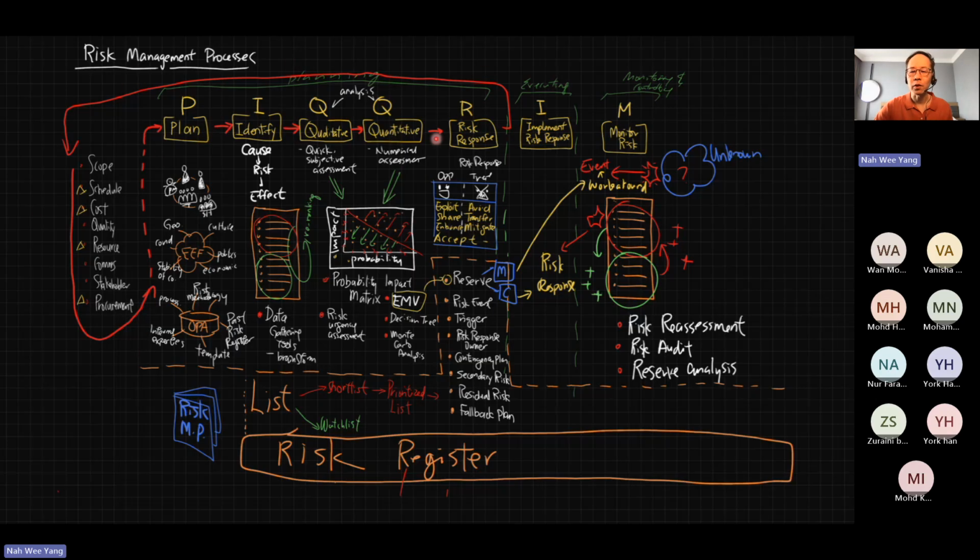And when do we stop the loop? When we're happy with the plan, we think the plan is realistic and stable, and everyone gets agreement to it, and then we can get this plan for approval. That becomes the baseline, the approved plan, right? So this is an iteration of planning. Risk is the last one that triggers all the other replan activities, right? So mainly this covers the process in planning, and then you go into execute and monitor and control.